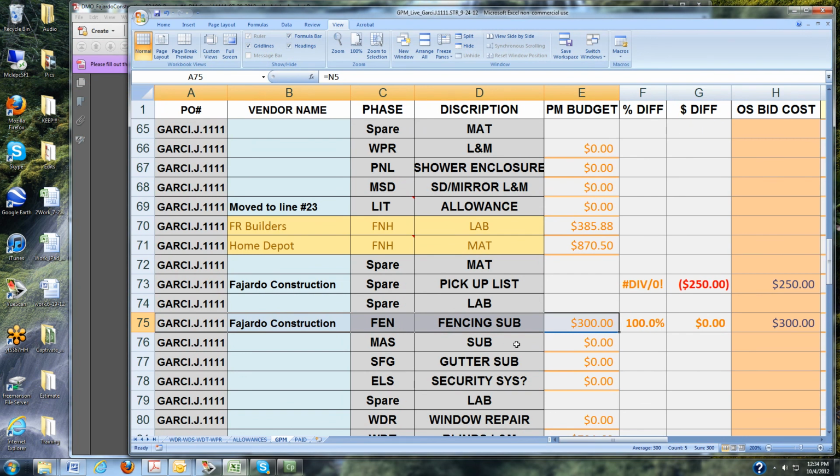On these supplements, extras, and credits, a rule of thumb that you could follow as a superintendent, let's just say, is that the estimating department hasn't filled in these lines yet. What you could do as a super is add up all the money for the fencing and just cut it in half. So say you had 50% of that money to do the fencing.